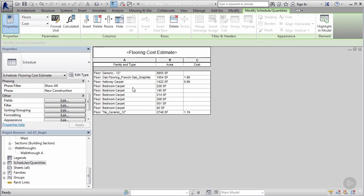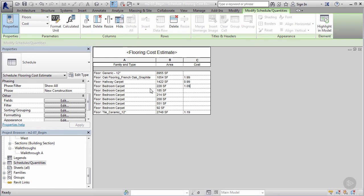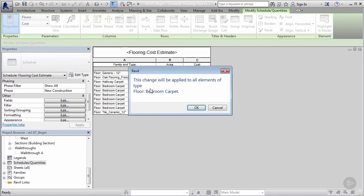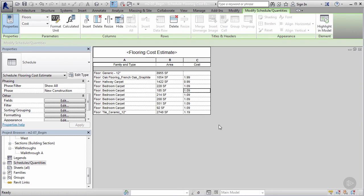So watch this. You notice our bedroom carpet here—we don't have a cost associated with it. I can come to any one of those fields and simply go, we're gonna say the bedroom carpet was a little bit more expensive and it cost us $1.09. I'll type in this, and then anywhere in these fields where we see bedroom carpet, it'll populate that space. I'm gonna hit enter. Just as I said, this change will be applied to all elements of that particular type. I'm gonna say okay.